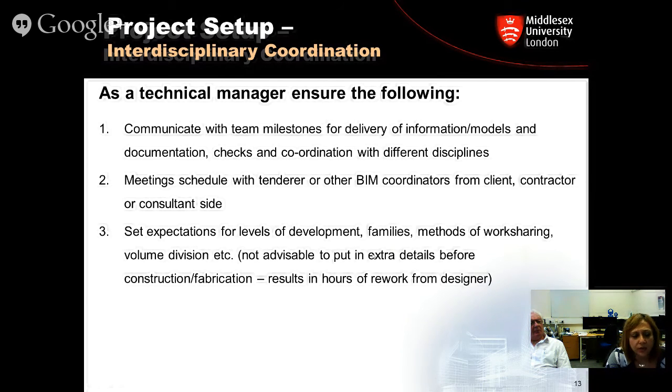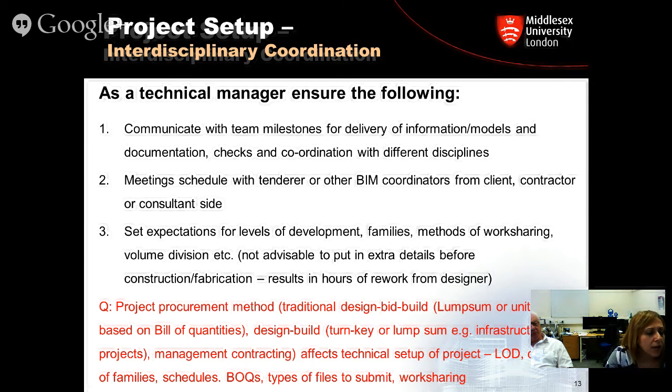But please be careful that as a manager, you must make sure that your team do not get overexcited and put extra details in beyond the LOD or beyond the details that are required from them. And this tends to happen a lot, especially in the designer phase, in the designer team, sorry. So please make sure that everyone knows to what level of detail or to what level of complexity they have to put inside the models, or in the information that's going to be added for the models or external to the models. Okay.